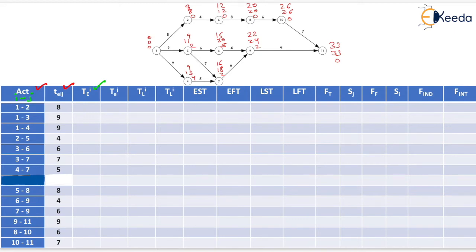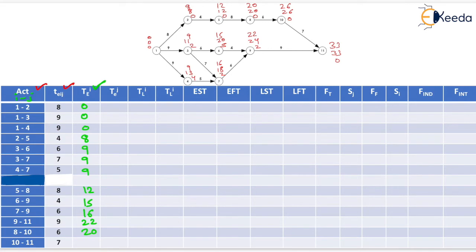For event 1, TEI = 0 (filled in three rows). For event 2, TEI = 8. For event 3, TEI = 9. For event 4, TEI = 9. For event 5, TEI = 12. For event 6, TEI = 15. For event 7, TEI = 16. For event 9, TEI = 22. For event 8, TEI = 20. For event 10, TEI = 26. We have now filled the TEI values.